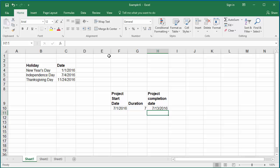You can add all holidays in the year as a range and can use that range in all WORKDAY functions used in the worksheet.